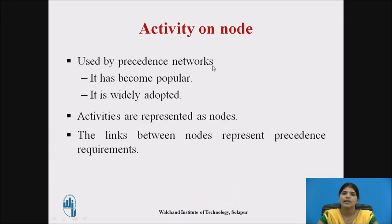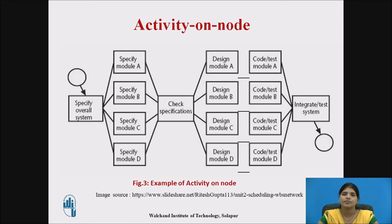Then we see activity on node. This is a very popular method used by precedence networks. In this approach, activities are represented as nodes, and the links between nodes represent precedence requirements. Here is an example of activity on node — each activity is represented inside the node, and each node is connected with the help of arrows.